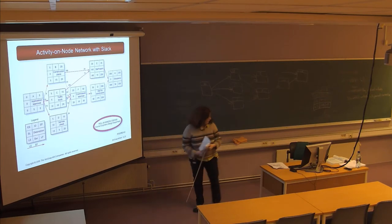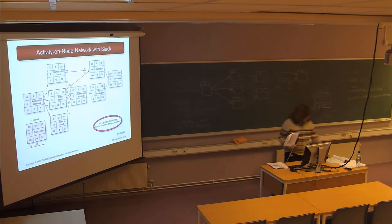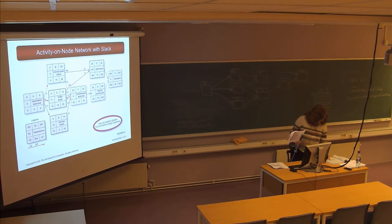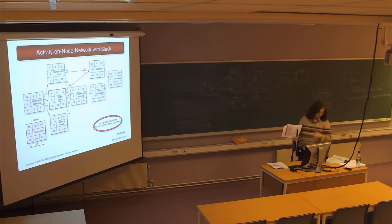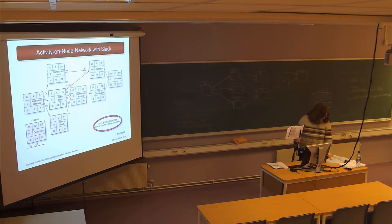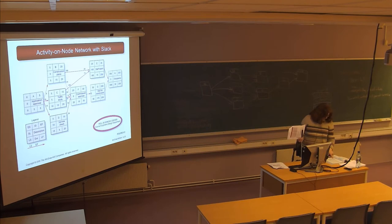Looking at the image on page 173, there's a series where the total slack was 15 on the top series. The free slack at the end of the row was 15, but the free slack on the preceding nodes was zero, because they're proceeding in the same chain of events.